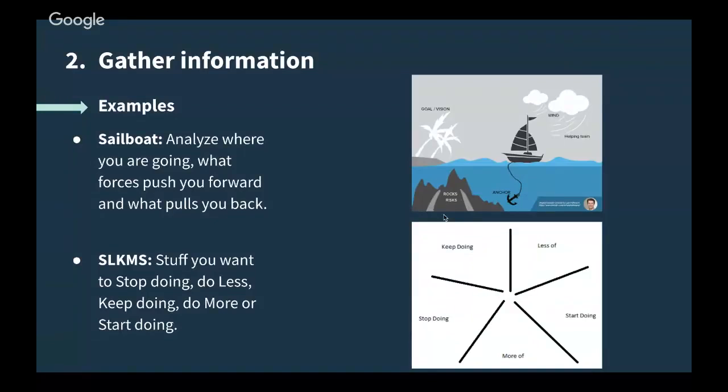And these rocks in the bottom are the risks. So we are going forward, and there are things that we are not seeing that might harm us in the future. So that's a great opportunity for team members to identify risks and other potential problems that we may have in the future. And that's another source of topics to discuss and to solve. So I like this one as a general purpose because it gives you a whole vision of the project and things that we should discuss later.